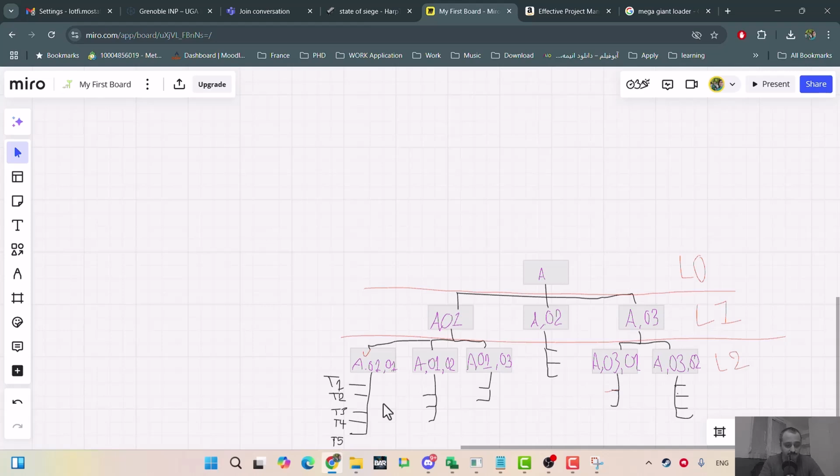If there are multiple deliveries in a single task, you may decide to break them into separate tasks, or you may decide not to, and define them as a note for the task or as a deliverable milestone linked to the task.